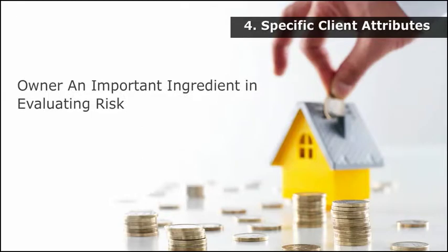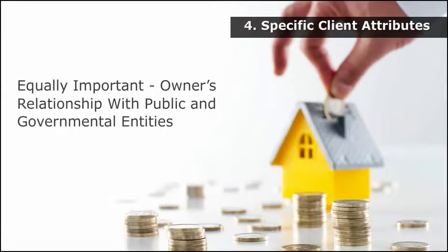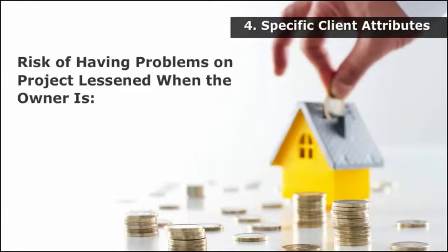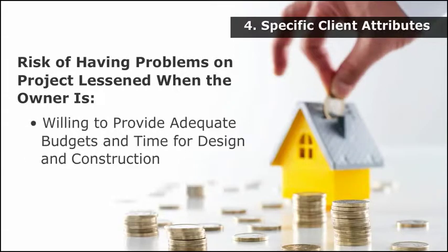The owner is an important ingredient in evaluating risk, and your relationship with him or her should be examined with this in mind. Equally important is the owner's relationship with the public and with governmental entities that must approve and review the project. Your risk of having problems on his or her project is lessened when the owner is knowledgeable, sincere, financially capable, fair-minded, and willing to provide adequate budgets and time for design and construction.